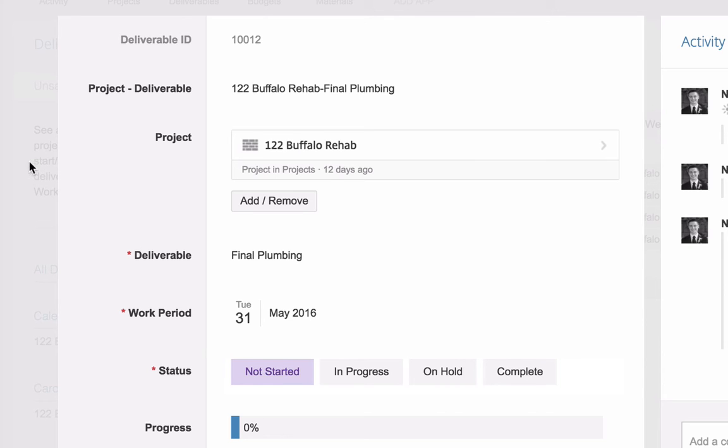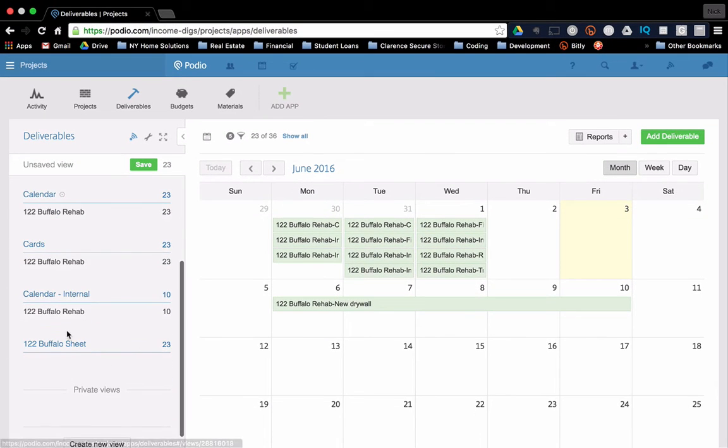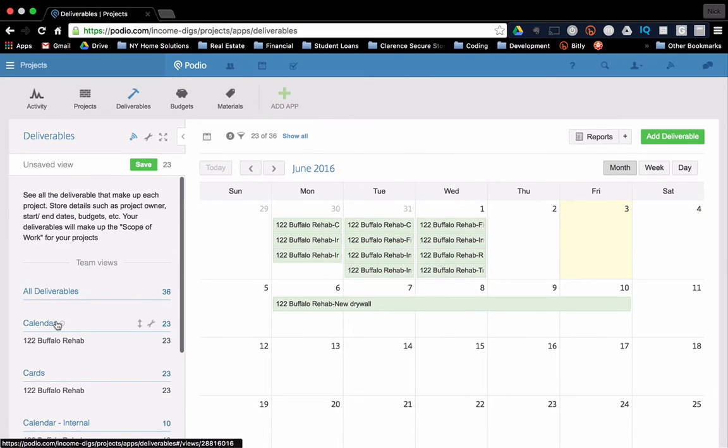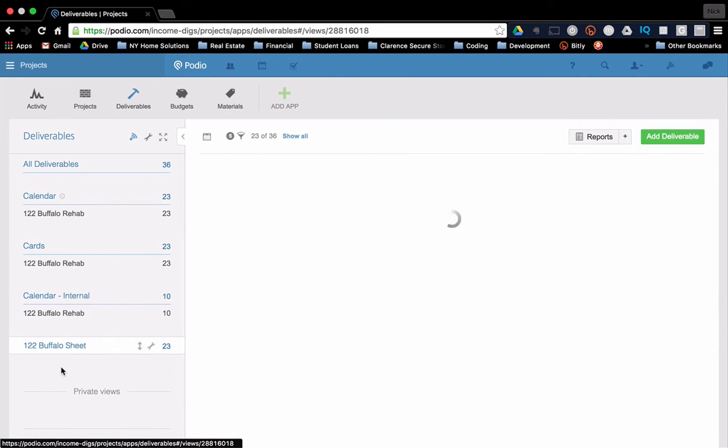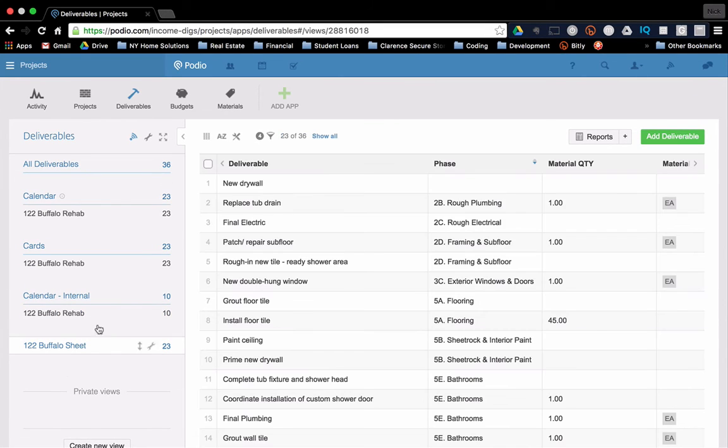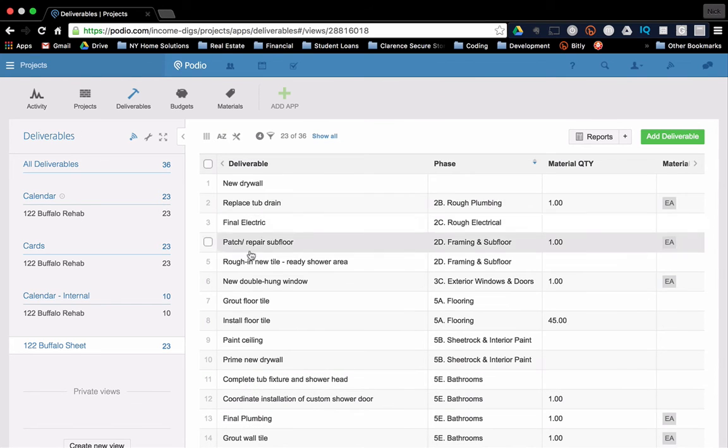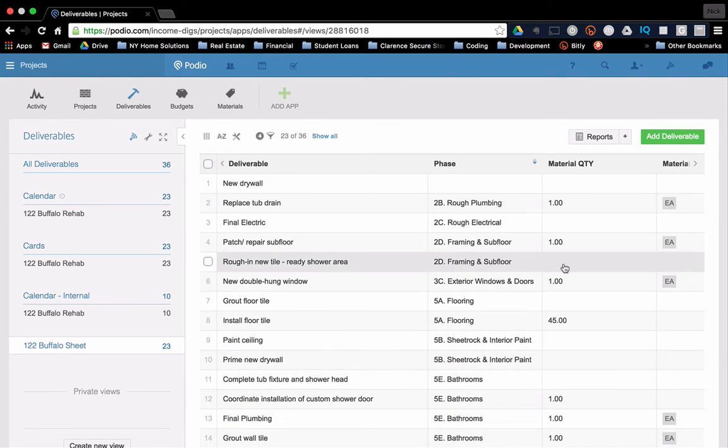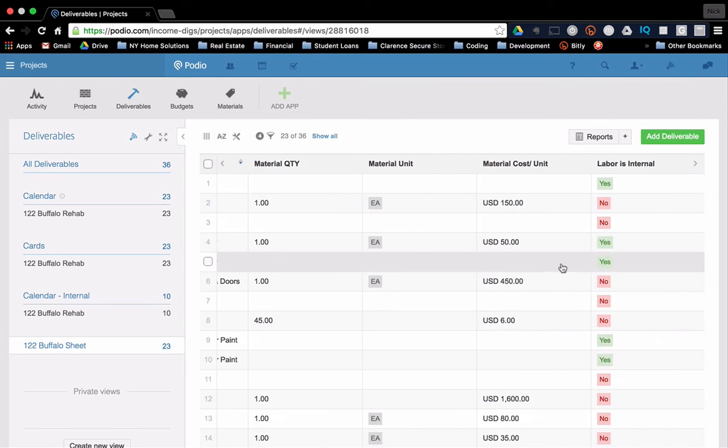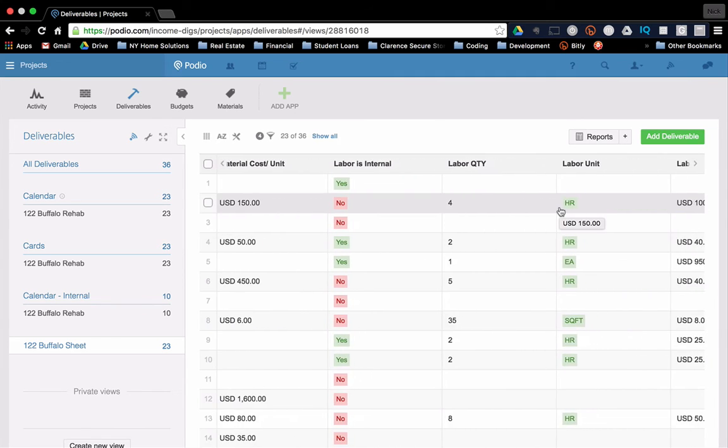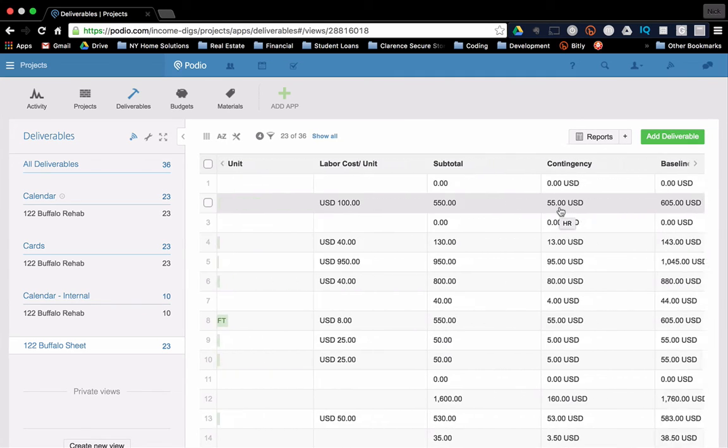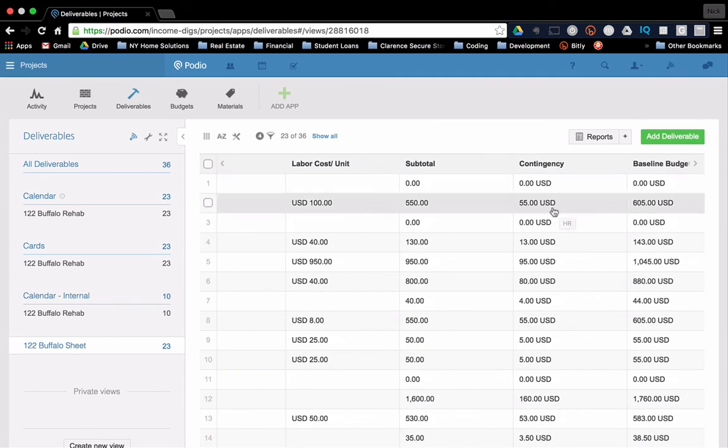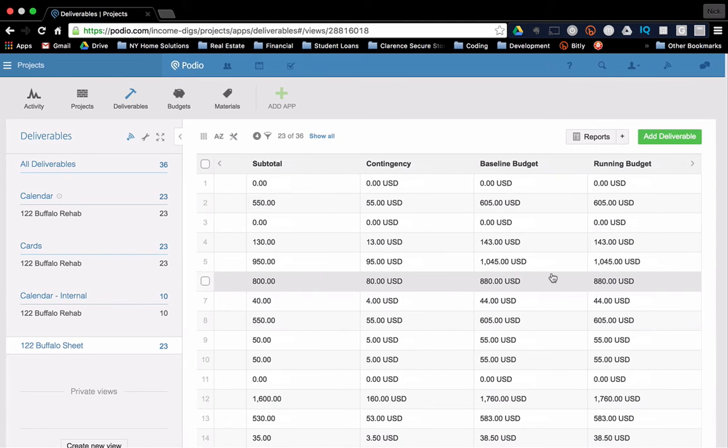That's arbitrary for now. But the idea is that you have a table or you have a list of tasks for each project, right? Okay. It's a list of tasks for each project. And you have all of their data in here. Material unit, material quantity, their cost, labor cost, other costs. The contingency is calculated. The baseline budget is calculated.